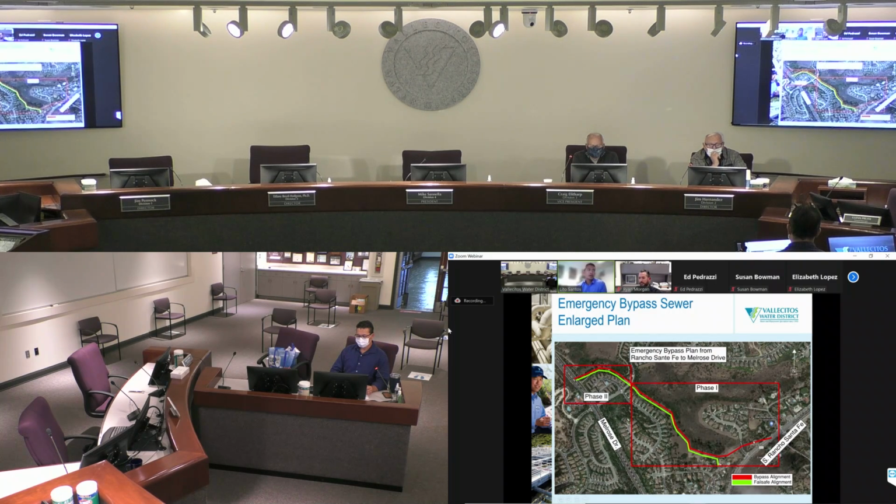So our strategy is to line the sewer bypass from the Pine Nursery over to Melrose. We will be installing 5 manholes along the alignment, approximately every 1,000 feet. We will also be installing, at heavy bends, access pits to be able to access and pull the liner through. As part of a cost savings for economy of scale, we had also combined this project with the fail-safe that runs parallel off Red Wing over here on this cul-de-sac and going through that canyon area in the back over here, where they run parallel to the sewer bypass, to help save the costs.